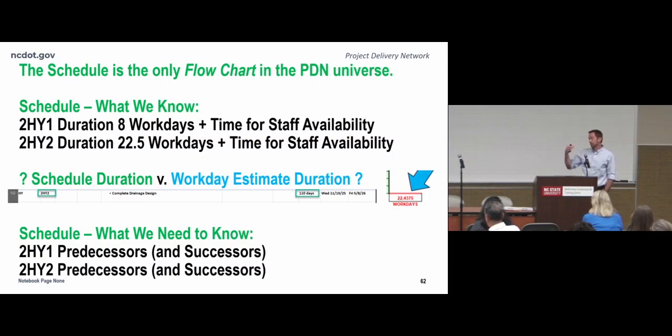So you have to stop your design, hand it to a supervisor to check, and then it sits on their desk for a week while they get ready to check it, and then you pick up the design again. In the meantime, you've been working on another of your 5 projects. So your schedule duration is usually much, much longer in calendar time than your total work days. Your fee is based on the work days, and your schedule is based on the schedule duration. Your schedule duration is bound by your start and stop date, calendar time, right here. That's what governs your duration.